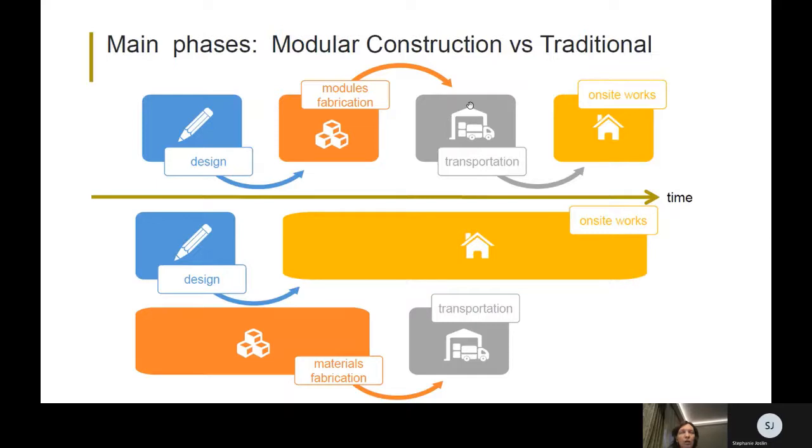In different parts, for example, for traditional construction, it is not a big problem when something is damaged during the construction on site. In most cases, it could be repaired. This is not the equipment, but the construction works. With the modular construction, it's not so simple. In most cases, we need to make the changes or even refabricate the modules, which leads to a rather long period of restoring the damaged property.